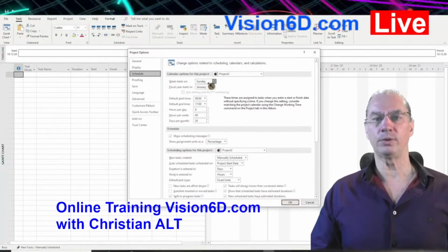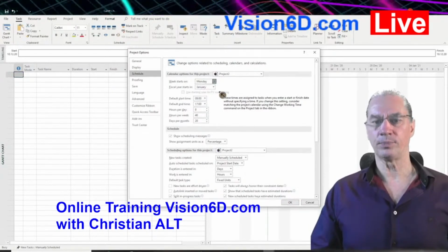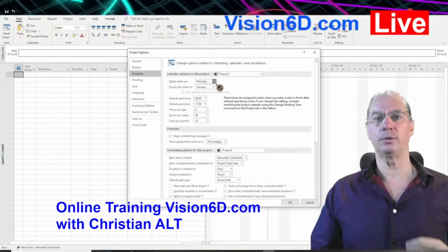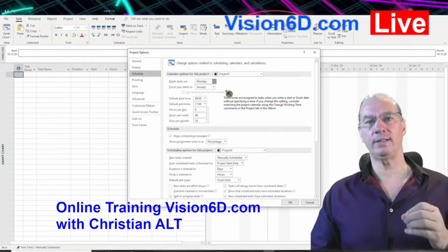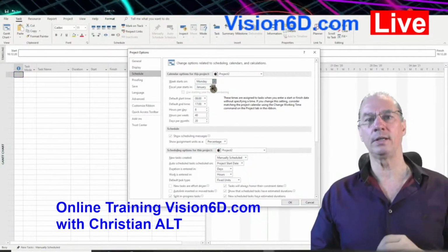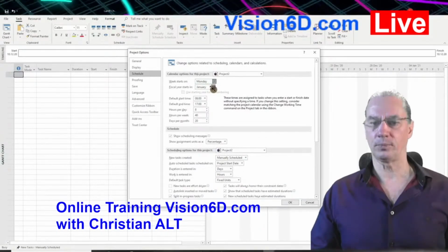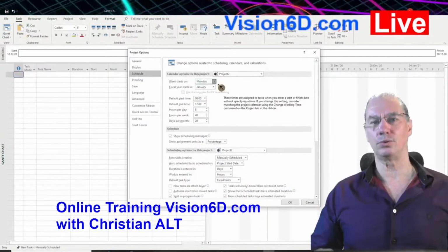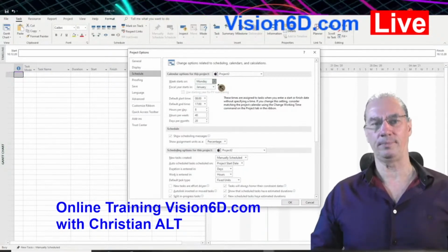By default it is set to Sunday. That's not the case in how I work; we start the week on Monday. If I didn't change this, all the planning would start from Sunday, considering Sunday a working day. Maybe for you, in your culture, it is like that, so you need to set it to Sunday instead of, like me, Monday.